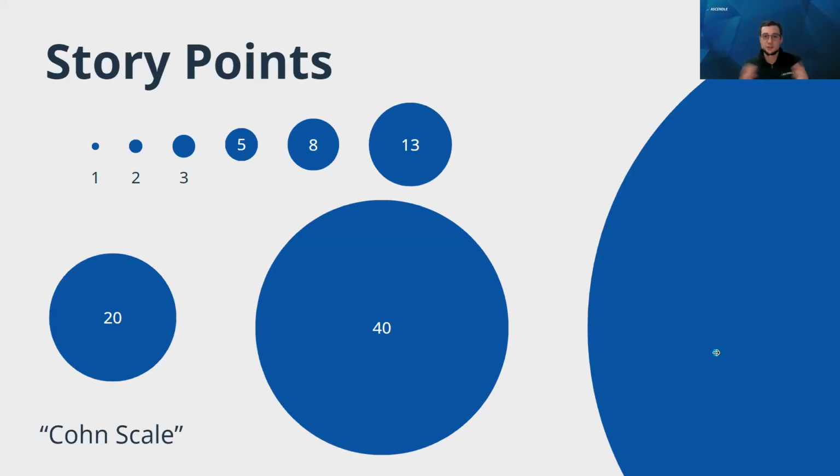So because it's hard to quantify small, medium, large, and extra large, we use what we call story points. So it's a cone scale, or a modified Fibonacci scale, that allows us to choose a relative size to something. Again, we want to emphasize this is not an hour. This should not take 13 hours, or this should not take 13 days. There's no necessarily measuring point with this. It's about relative scale again. So it's 13, 20, something bigger, or smaller. You'll notice that each of them is about 50% give or take from the one next to it.